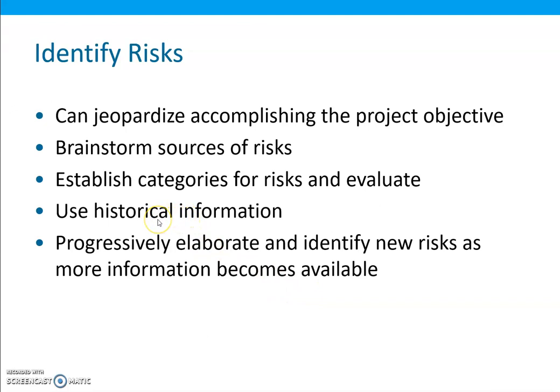So in this case, we can identify some specific risks. For example, incorporating advanced technology in a new product and performance requirements for taking measurement 10 times faster than can be done currently. Technological advances that could make the originally selected technology obsolete before the project is completed. And also a first time use of new robotic equipment for a rare and complex surgical procedure. So all these are risks.